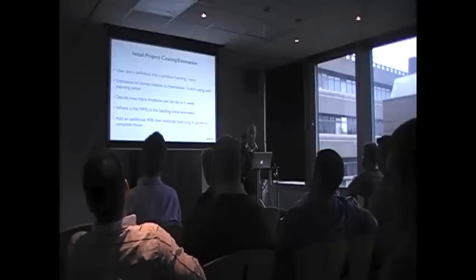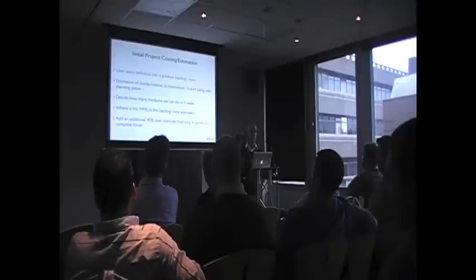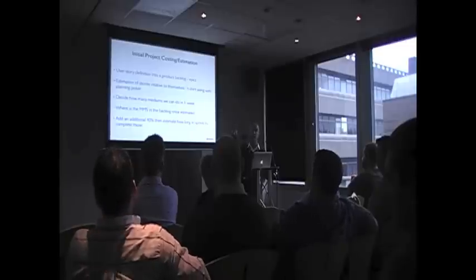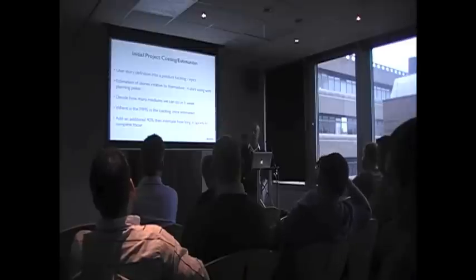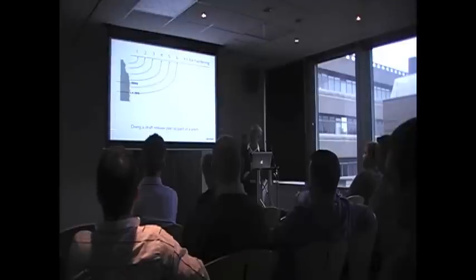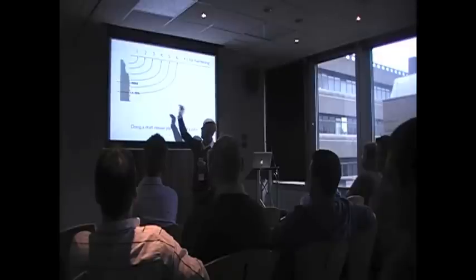And then figure out where the minimum marketable set is. You know roughly from the brief that you've received, they've said, we need all of these bits, this is what this project entails. We've got these other bits here that we'd be good if Umbraco did, but we understand there may be some bespoke development involved there. And these bits, phase 3 for instance, sometimes you get briefs that have different phases in. And then we add an additional 40%. So what we tend to do is have the user stories there in a big column. We know that that MMS level there is what they need to launch.